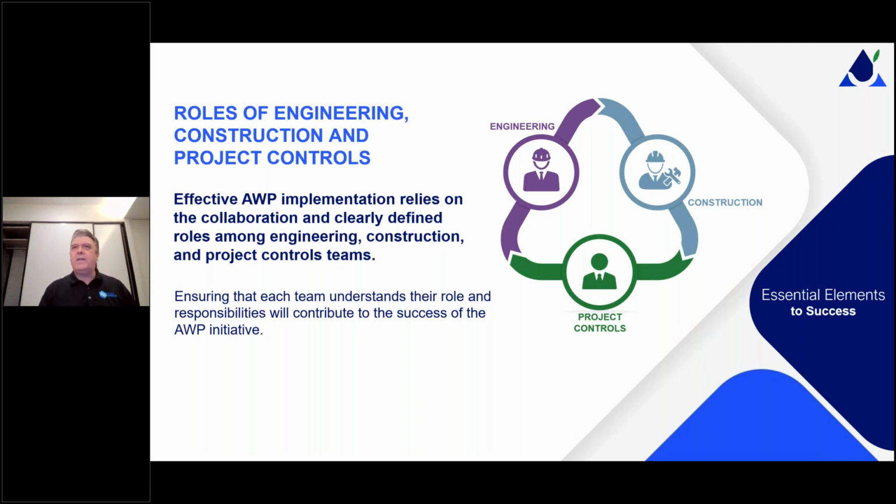No, the model has areas. The model has service codes. The model is broken down according to an engineering work breakdown structure, and the computer is really good at remapping that. In fact, then construction can iteratively plan and change the packages. And that information can come back in engineering and drive priorities.